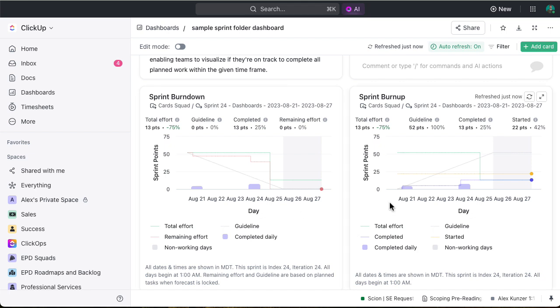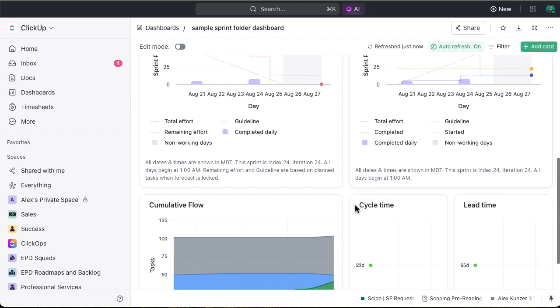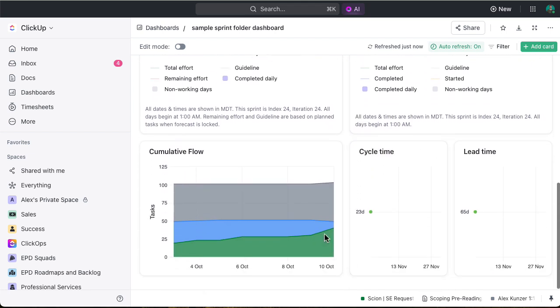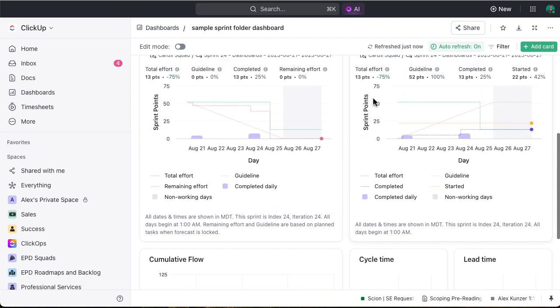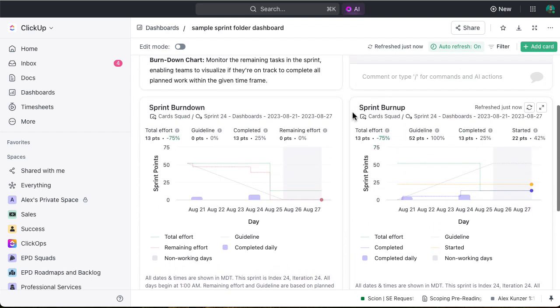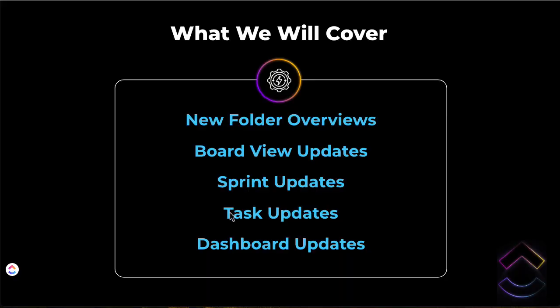The inverse is the sprint burn up or tracking how fast you've completed the sprint points that you have assigned at the beginning of a sprint. You can also see other information like cumulative flow, cycle time and lead time, and also there is a velocity chart to get your velocity score to better understand what the sprint points are completed by a given team.